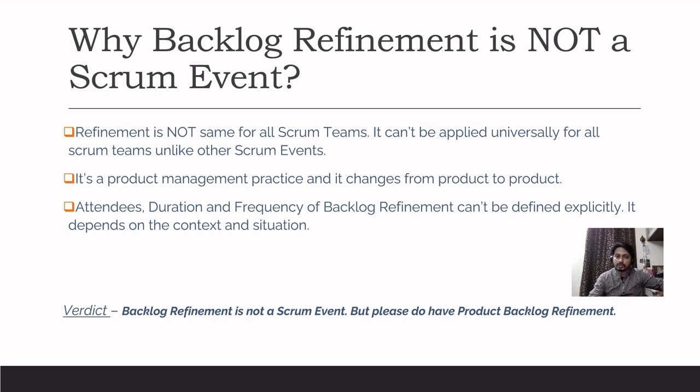It is well thought through, and it has got all the required information there, right? So another very important reason why it is not an event is that we can't have a predefined set of attendees or a predefined duration or predefined frequency for this backlog refinement. It is very contextual. Do we have an upper limit that it should not take more than 10% of the capacity of the development team?